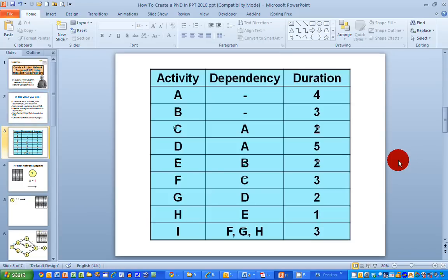I have PowerPoint open in front of me here, and on this table in blue, we have typical information that we need to draw a project network diagram. In the first column, I have a list of activities — I'm calling these activities A, B, C, D and so on. There are nine activities in total. In the second column, I have the dependencies listed, so each activity is dependent on other activities being completed.